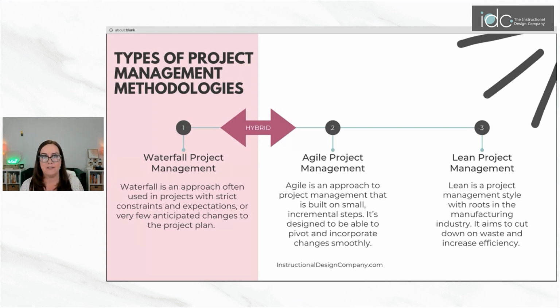Because in the agile environment, I would have all the information that I need, all the resources, where I could prioritize everything, look at how long each of these different tasks take, what are the dependencies, and then in turn give an estimate by when I could have it done. But the truth is, in L&D, we're often date driven, which either puts us in a hybrid format or in that waterfall format.